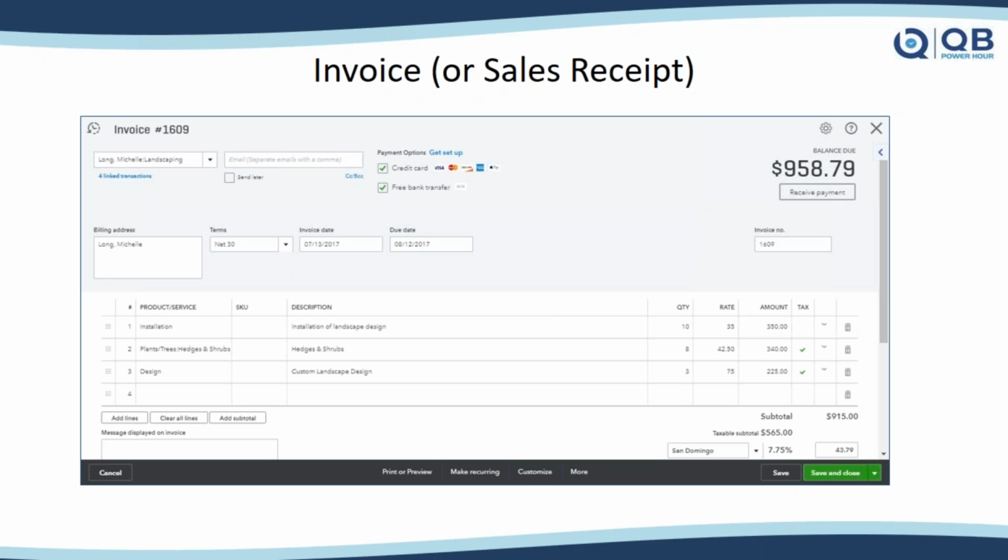We've got some other questions like, how would you cost insurance to the job? So here's one of the things that a lot of people will ask, how can I allocate insurance or overhead to these projects or jobs? A lot of times what companies will do is come up with an overhead allocation rate. Let's say, for example, 3% or 5%, and they choose what they want to base it on. Do you want to base it on gross revenues or net gross margins, or what do they want to base it on? So you work with the owner to come up with what is the overhead burden rate.